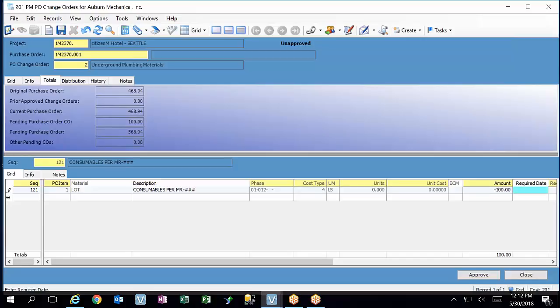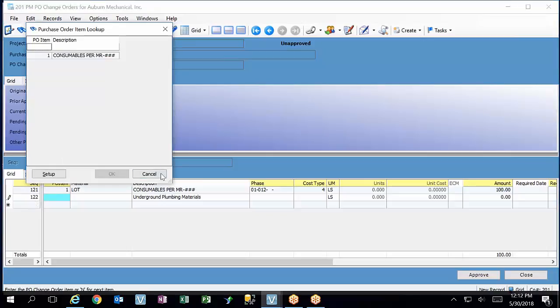You're taking away something from somebody. Sure. Like Isaac said, that's not typically our process, but on change orders we'll do deductive change orders, because the owner's going to say, well, we're not going to do this. We're not building out that part of the floor, or we ran out of money, or whatever their reasons are.